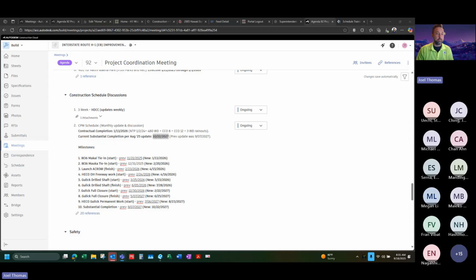Project controls in general, schedule, budget, and risks, are all important. Another thing I do with the schedule is look at the critical path and try to identify sections of concern. For example, on Ola Lane, we have drilled shafts for our new bridge abutment.